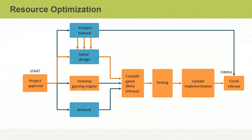For example, when developing a new computer game, designing the game is a critical activity, but preparing a product manual isn't. In this schedule, the project manager may be able to move some technicians off preparing the manual and onto game design to make sure the project can finish on time.